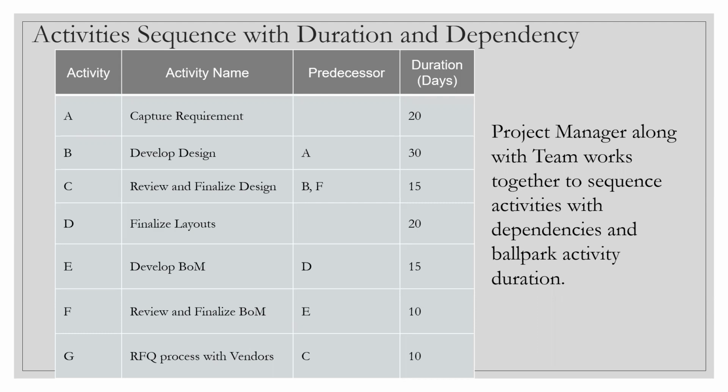Once you draw the network diagram, they will give you a sheet with the duration of each of the activities. Then you have to plug in the durations, go through the entire list with a forward pass and a backward pass, find the float, and then find the critical path. So the question in the exam will be: looking at this particular activity list, what is the critical path?